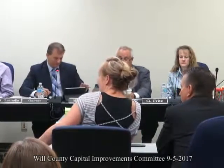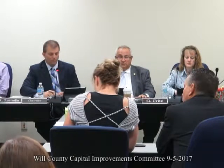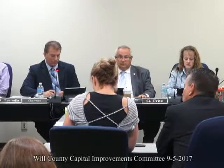Good morning, everyone. I'm not sure if you have the award recommendation or the change order at your disposal. Yeah, it's in our packet. Okay, just making sure. All right, so what you have attached is the award recommendation for Pablaki. Pablaki was the only bidder that we received. We went out to many bidders, and they were the ones that we received. We've used them in the past. They are a great company, so we are recommending them for $198,359. And this was for the signage.